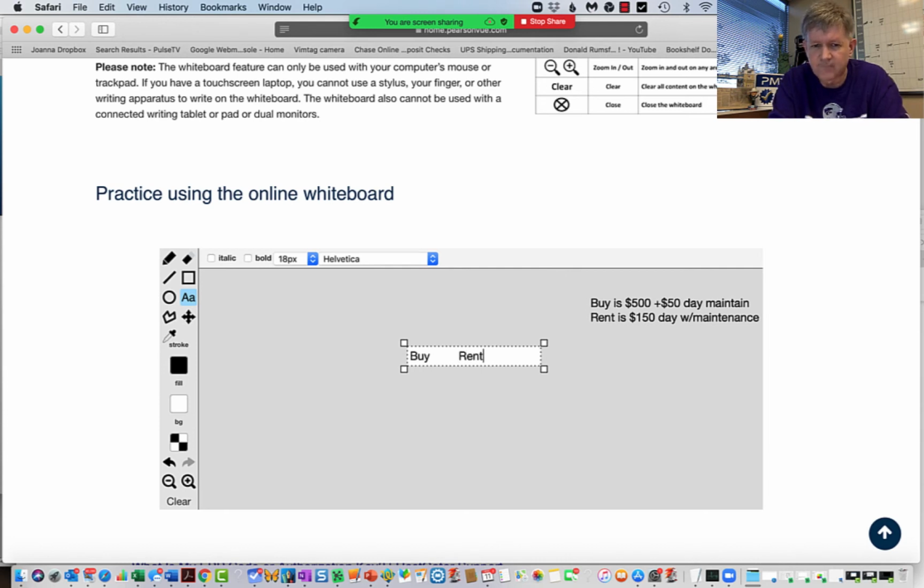Okay, now I'm actually going to do day as well. There we go. Now, you're just going to add it up as you go. So day 0, I'm going to say I bought it for $500, because before I start using it, I have to buy it. Versus rent is $150. Rent is 0.